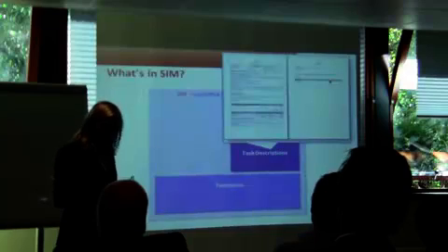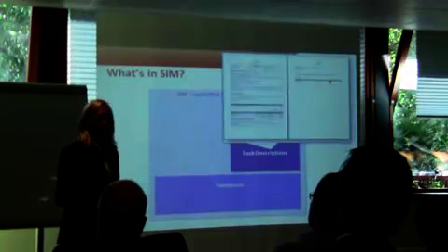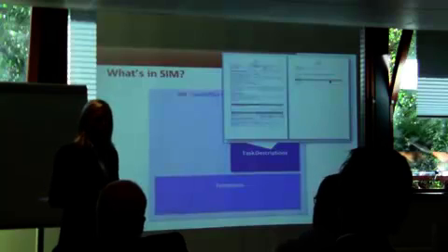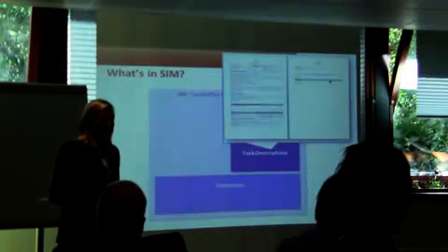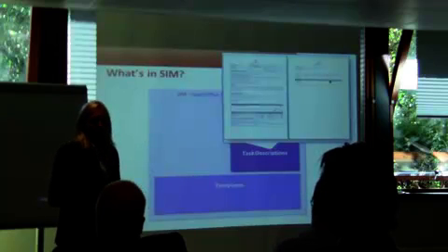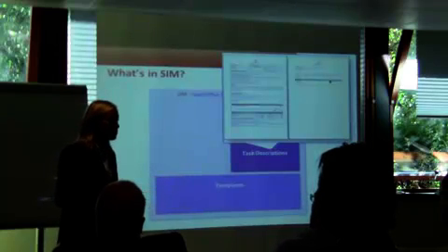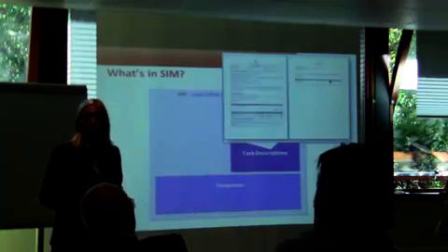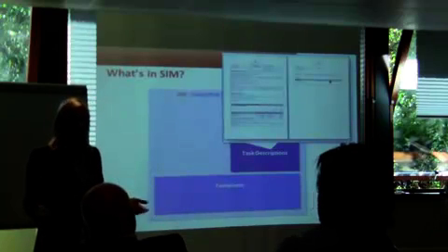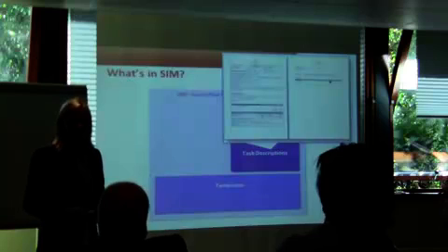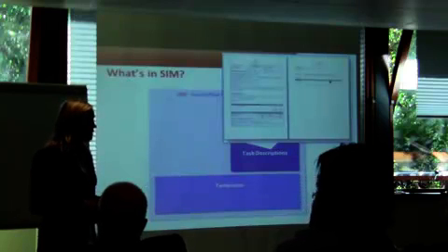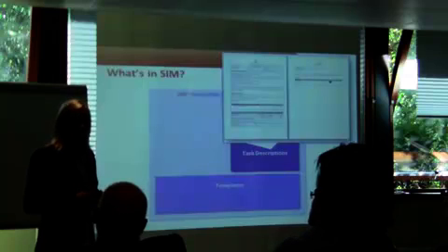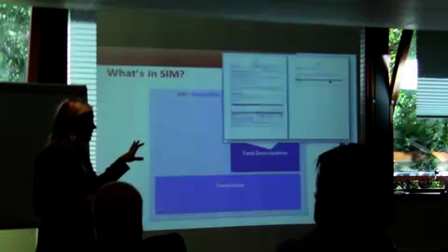And also the system requirements, so that the customer also sees that these requirements should be met to be able to deliver the service. And by using this, you get a lot fewer discussions when it comes to pricing. For example, if a consultant goes to a customer and is not able to install SuperOffice because the server isn't there yet, or it isn't prepared, the SQL hasn't been installed, etc., you don't have to have discussions about the payment, because it's stated here that this should be prepared by the customer. So it's a very good way to secure your service income by using the task descriptions.